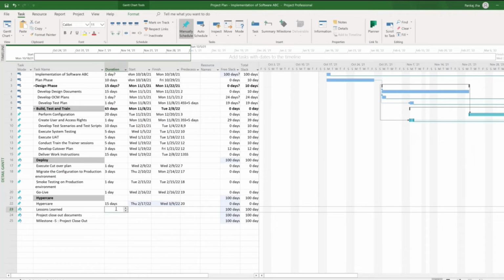Lessons learned. We must have a lessons learned to know what went well and what we can improve. Maybe let's plan for 5 days of lessons learned. Now again, lessons learned. Maybe I'll plan 10 days after go live. Right. So what I'm doing is I'll put FS plus 10 days.